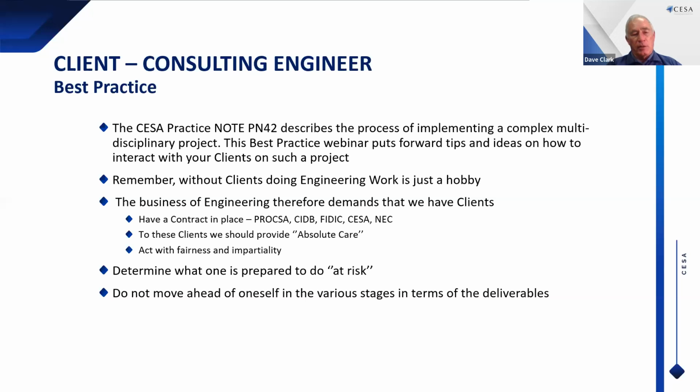And we did that, dug down, found the rock, then plotted on the long sections and worked out that the client's budget was only sufficient to dig out the rock. So we had to do the entire design again, going from 4 lanes to 2, to steepen up the cut and fill slopes. So just be careful about moving ahead in deliverables before you actually know what you're doing.